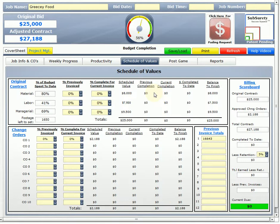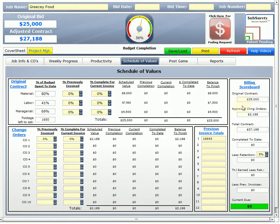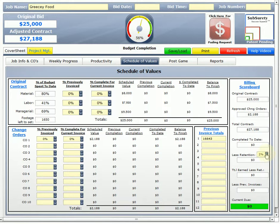This is our first schedule of values for this project. So we've done $0 for previous completion. We haven't entered any information yet, so current completion is zero. Completed to date, same thing. We haven't entered any information. The balance to finish, we still have the $25,000, which was our original contract. Our adjusted contract was $27,188 and that's shown down here. All automatically done for you down in the change order section. On the right hand side, we have the billing scoreboard. Same information just kind of breaks it down for us. Our original contract, what was our approved change orders, our total contract completed to date, takes out retention for us. We can change our retention if we have to. It's never less in my experience than 5%, but it has been more. I've had up to 10% retention. If we have to change it, we do that simply by clicking that adjuster there.